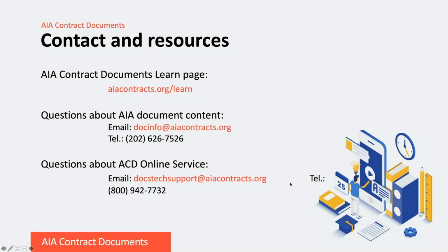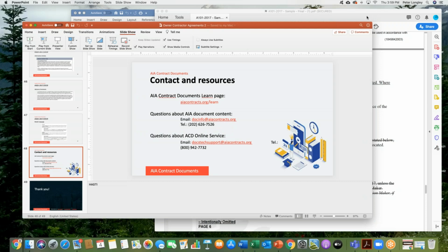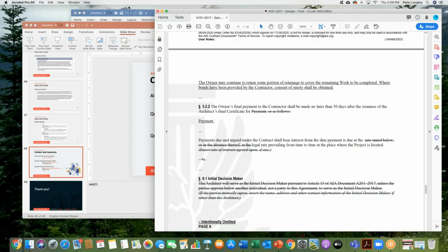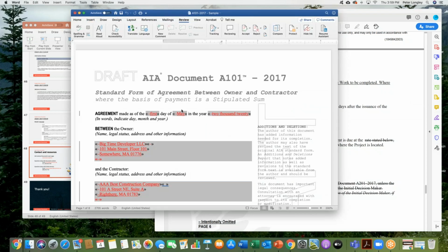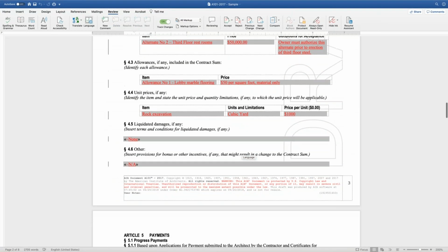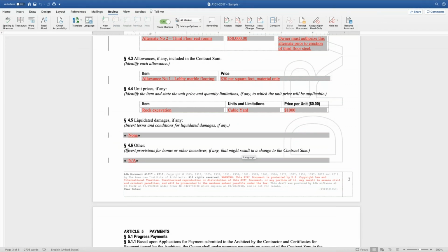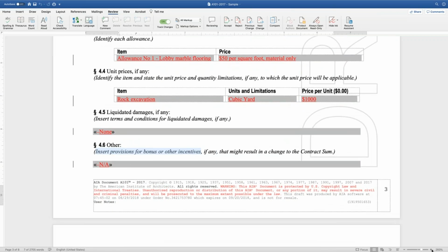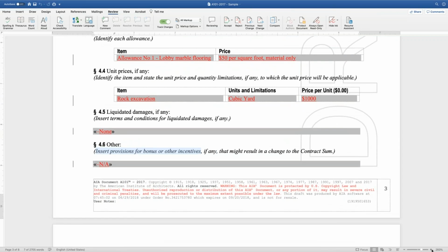Yeah, there is a full point, if you know where it is. Yeah, but in fact, that is a very good idea. Sometimes we talk about that guaranteed maximum price contract. There is often an incentive put in as a shared savings, so that if the price comes in under the GMP, the savings will be shared, for example, between the owner and the contractor 70-30. So this gives the owner or the contractor an incentive to finish early or to finish under budget.